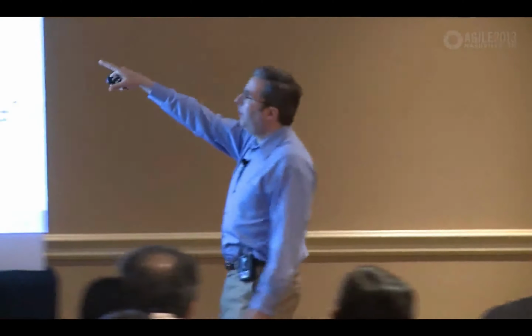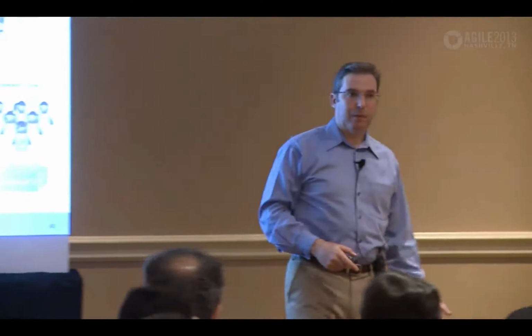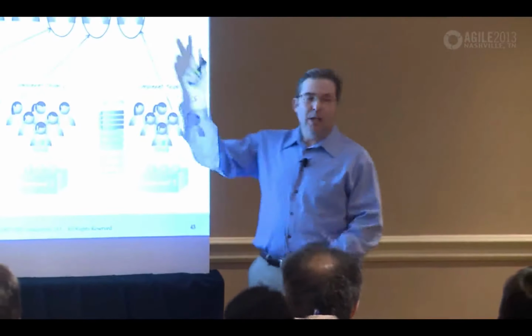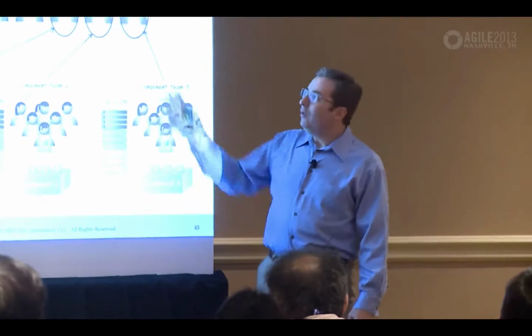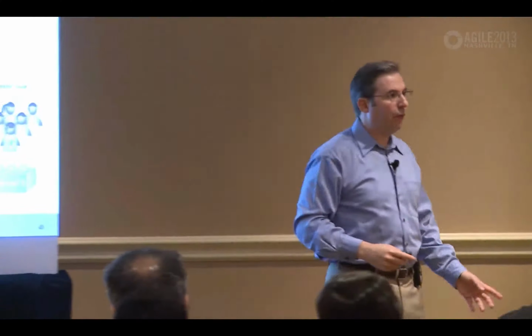And now these people up here have 2 responsibilities. They are both pollinators and harvesters. They pollinate the feature team with knowledge of the component area. And they're harvesters because they can take back changes that need to be made. Like this guy can come back over here and go, hey guys, look, I need to make a change in the component down here in order to be able to complete some features that we're working on this team over here. I'd like to run those changes by you for 2 reasons. First, I want to make sure I'm not going to stomp on anybody's toes when I do it. And second, maybe one of you has already done it, and I might be able to leverage and reuse what it is that you've already done.